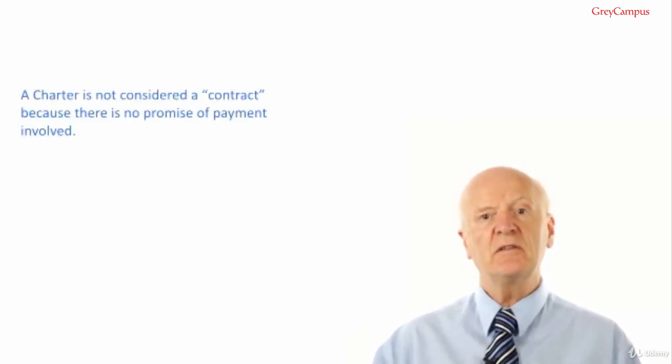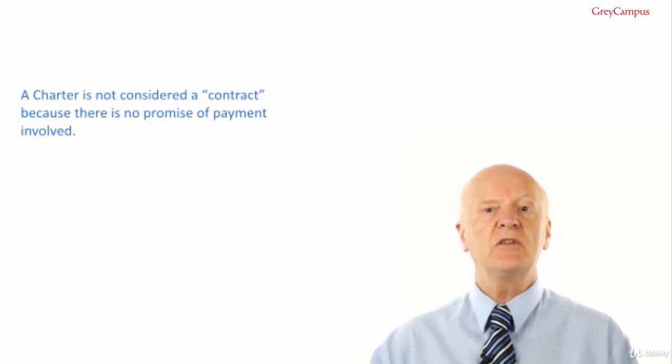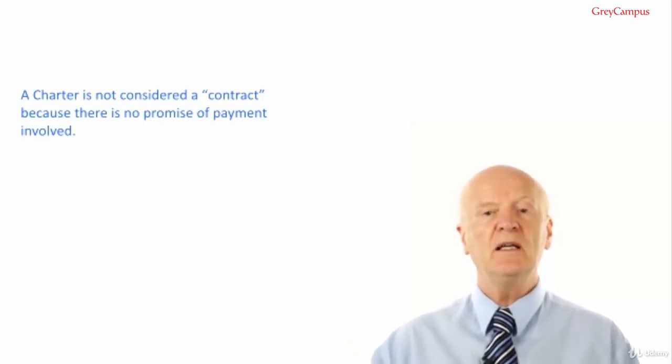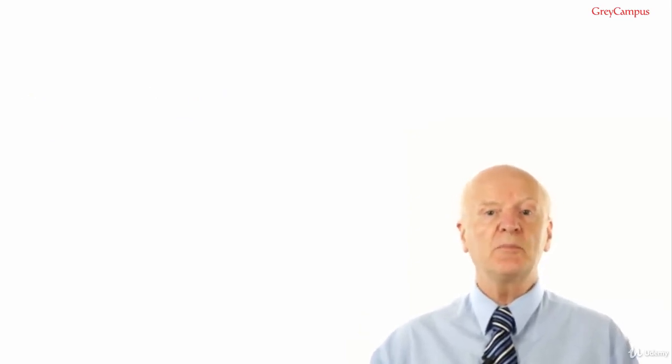The Project Charter establishes a partnership between the performing organisation and the requesting organisation. Formal contracts are the preferred way to deliver external projects because all contracts carry the ability to pursue legal remedy should one party default on the other. A charter is not considered a contract because there's no promise of payment involved, and please remember that for the examination too. We'll cover contracts in more detail in the module on project procurement management.